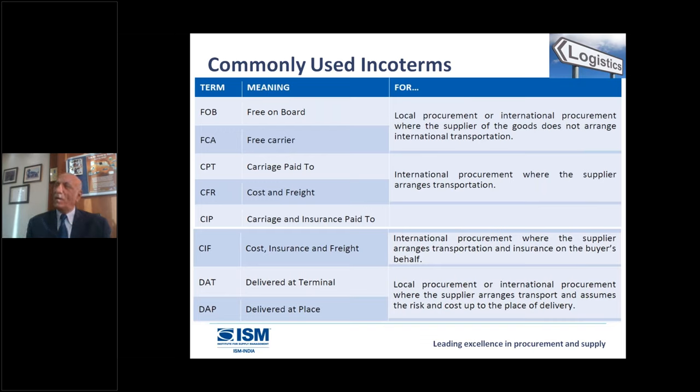If any approvals are required, you need to get them, particularly those in the pharma companies. If you're trying to import something for the pharma, you need clearances well in advance. Telecom equipment, the pharma equipment, they need some authorization very well in advance. So any one of you dealing with these two products, certainly I would say check in advance.